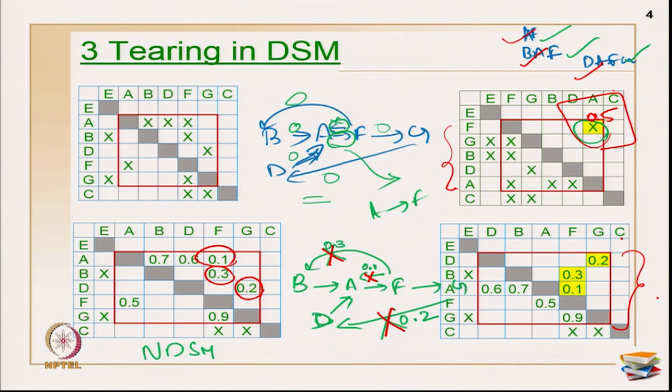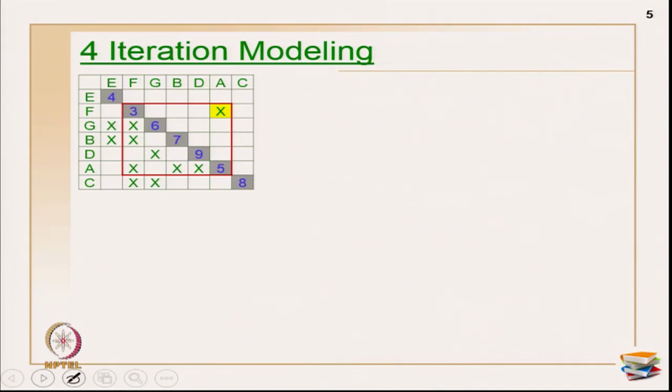The measure of performance for us is primarily on a time scale. Primarily you have to see what is the duration for this sequence and what is the duration for this sequence. Based on the repetition, you have got all these values: how many times the activity is going to repeat, what is the duration under each repetition, and how are you going to see the whole project, that you may have to consider now. For that we have to do the iteration modeling, which is the last step.